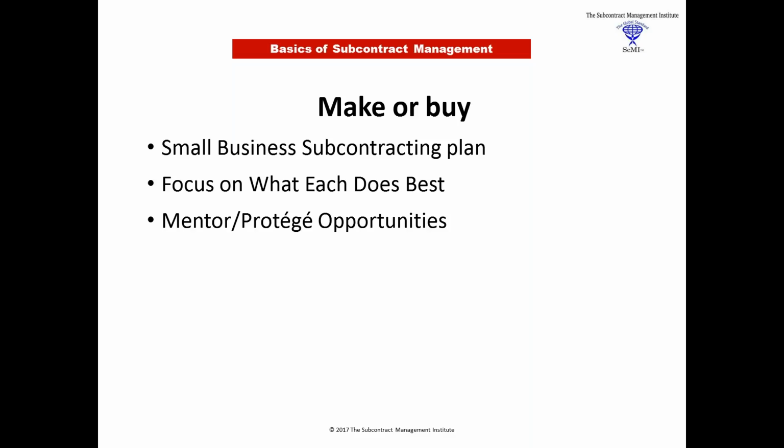To start that discussion, though, I want to talk a little bit about the Small Business Subcontracting Plan because it's a big piece of this. How so? Well, the Small Business Subcontracting Plan is a method by which the government makes sure that the prime contractor will adhere to the socioeconomic policies as found in FAR, which is a reflection of what's found in law. And so through this plan, goals are established for the prime contractor to award a certain percentage of contracts, dollars under the contracts, to veteran-owned business, disabled veteran-owned business, women-owned business, other small businesses, 8(a) businesses, HUBZone business.